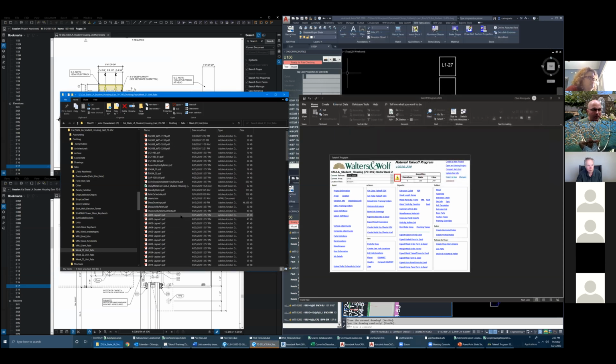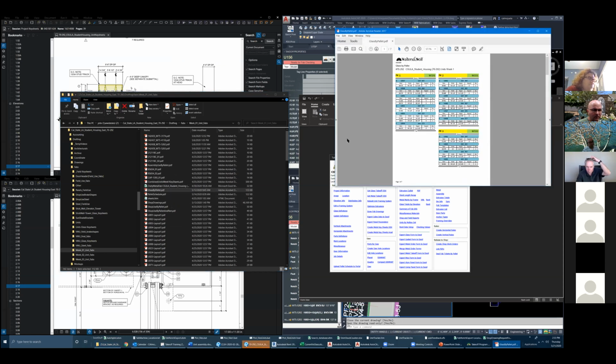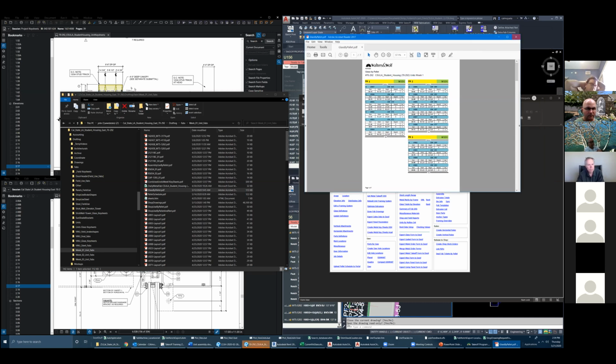Also in the release folder are the glass by pallet. And so this is important, that we have to make sure that the glass is correct, because you don't want to find out that the glass doesn't fit the frame when you're trying to assemble it. Because I heard their lead times on glass is pretty long, and they have to set that unit aside, and they can't package that entire pallet without that one unit missing.